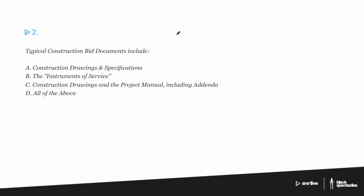So construction bid documents, first of all when do the bid documents happen? So typical project, you've got the sort of starting point, and then you go through SD and then you go through DD, that's schematic design and design development, and then you get to CDs, and then there's a bidding phase, and then you have the construction administration phase, and then there's sort of a kind of end game of various warranties and other issues that happen at the end.